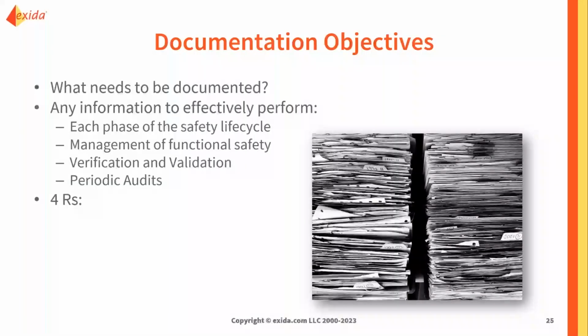From the documentation side, just in terms of the logistics of making sure that the right documentation is in place, this is anything that's needed for the life cycle. So for each life cycle step or phase, the actual management program and procedures themselves, verification and validation results, and also the results of those periodic audits. So we have to track, we have to have all of that information.